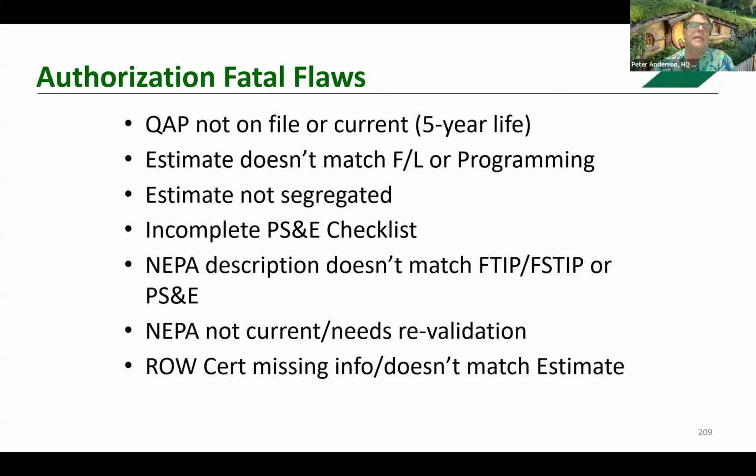But the key thing here is there's an open forum to allow everyone to hear the bids, such that if a bidder feels they need to challenge, they have the opportunity to hear what other people have bid and see how their bid compares to other bids.